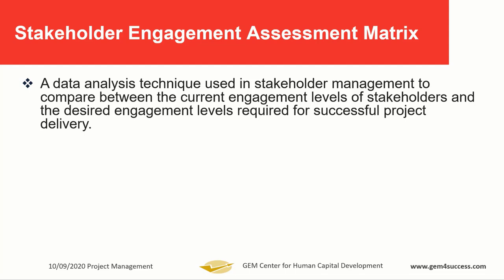Because you understand that after you have been able to classify your stakeholders, you would identify the ones that are not at the desired level. For the project to succeed, some stakeholders necessarily need to be leading. For example, you want to build an ERP solution for an organization. Half of the top management are neutral. That's a dangerous sign, because for the success of an ERP implementation, you need a lot of high-level buy-in. You need a lot of high-level champions on the project.